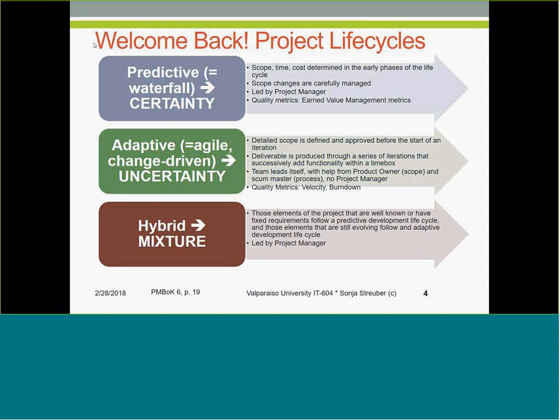If we have a project that is more explorative, if we're developing something completely new, or if we have major redevelopment going on, then an adaptive cycle, either a Scrum cycle with time boxes or a Kanban cycle in which work flows through our development cycle on a continuing basis, is probably a better choice.